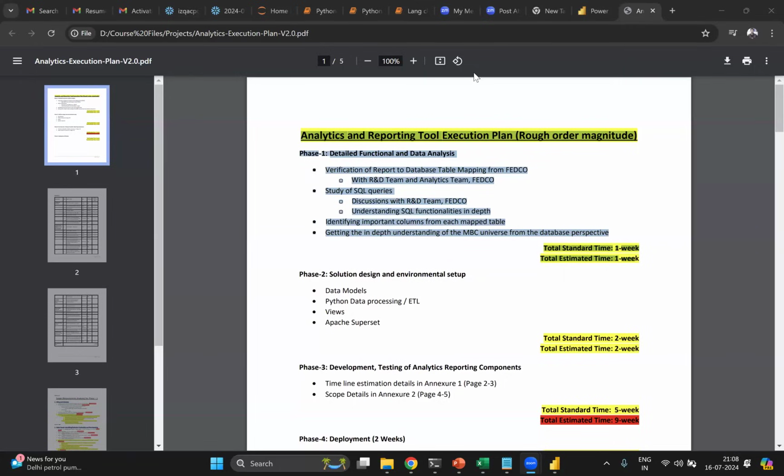I want to connect Python with this. So for each particular activity, we call it a sprint, two weeks. Within two weeks, what are you planning to do? I want to do Python, collecting the data, cleaning. So the three things are our backlogs. Now within each backlog, we will be doing the subtask breakdown, and the timeline for each task we will be preparing.